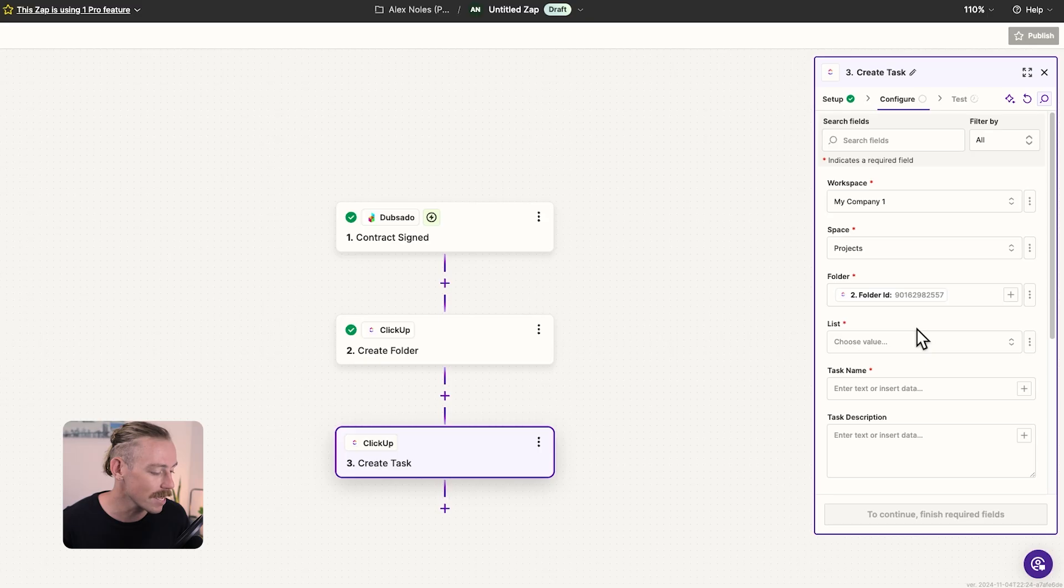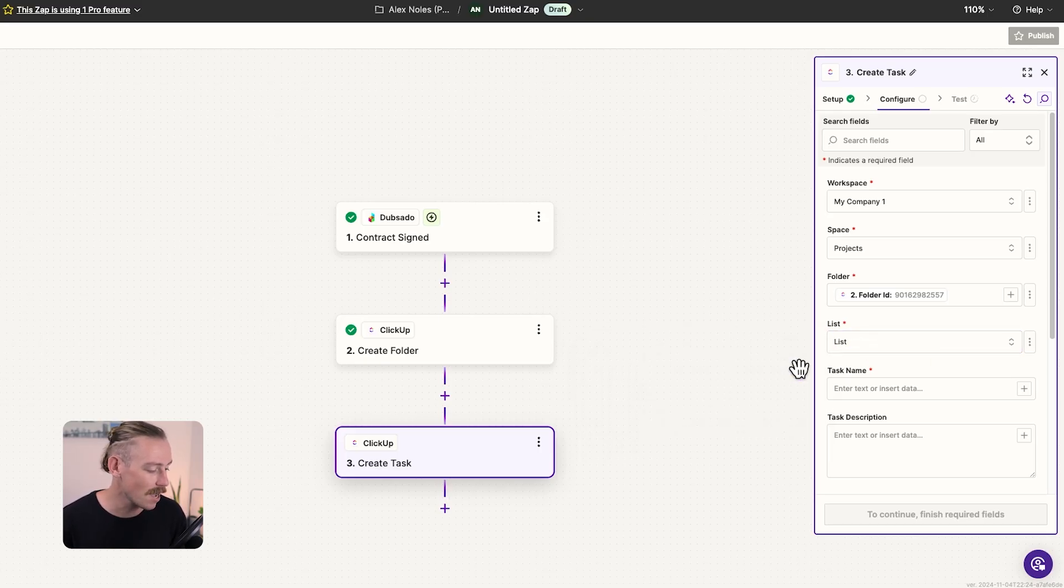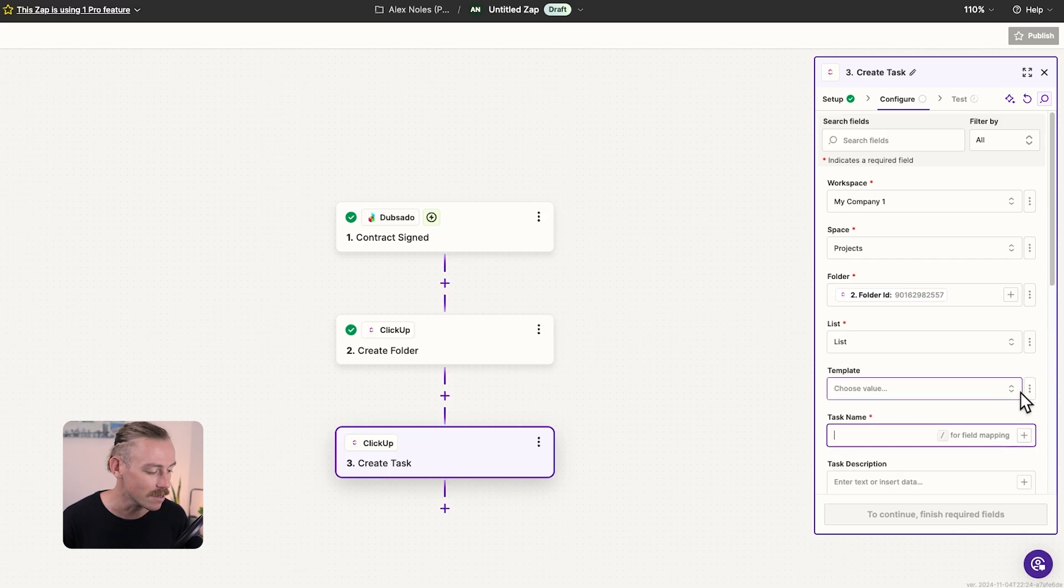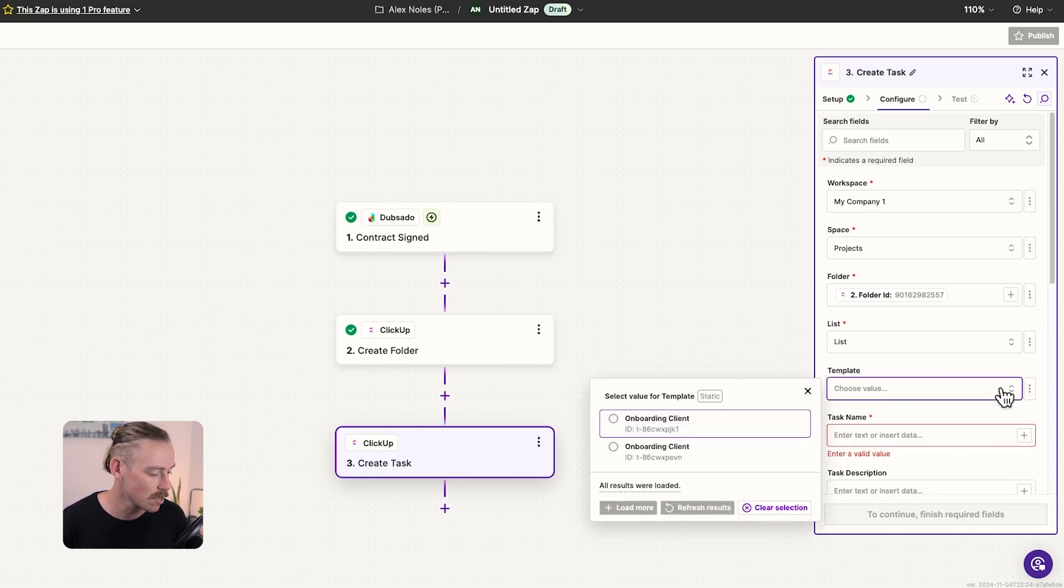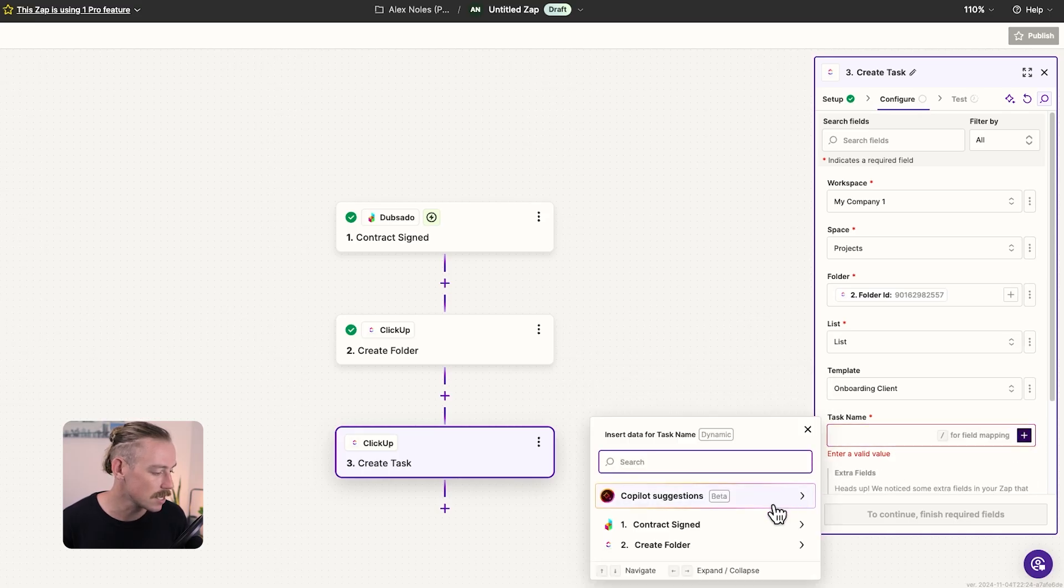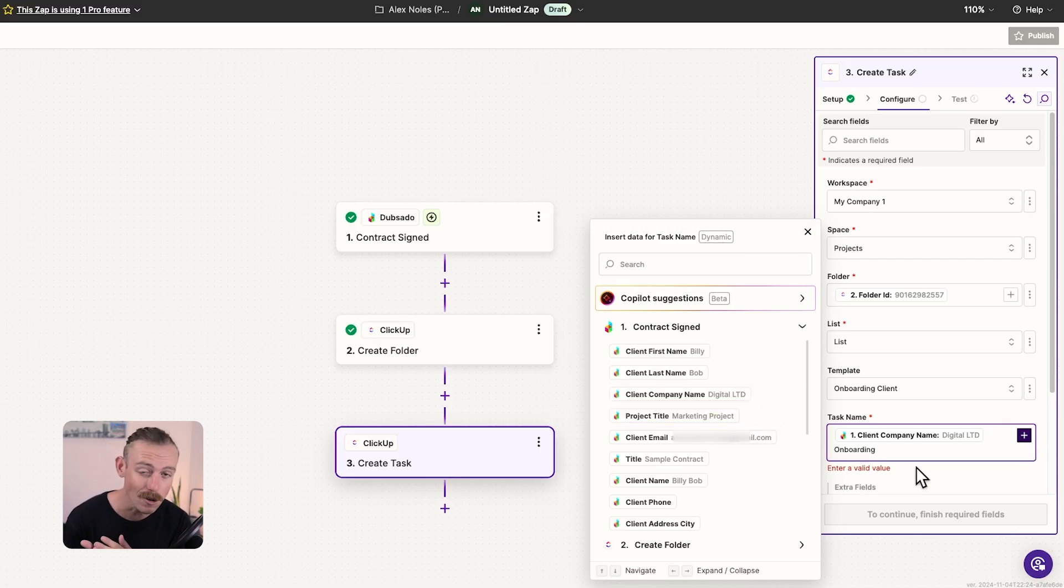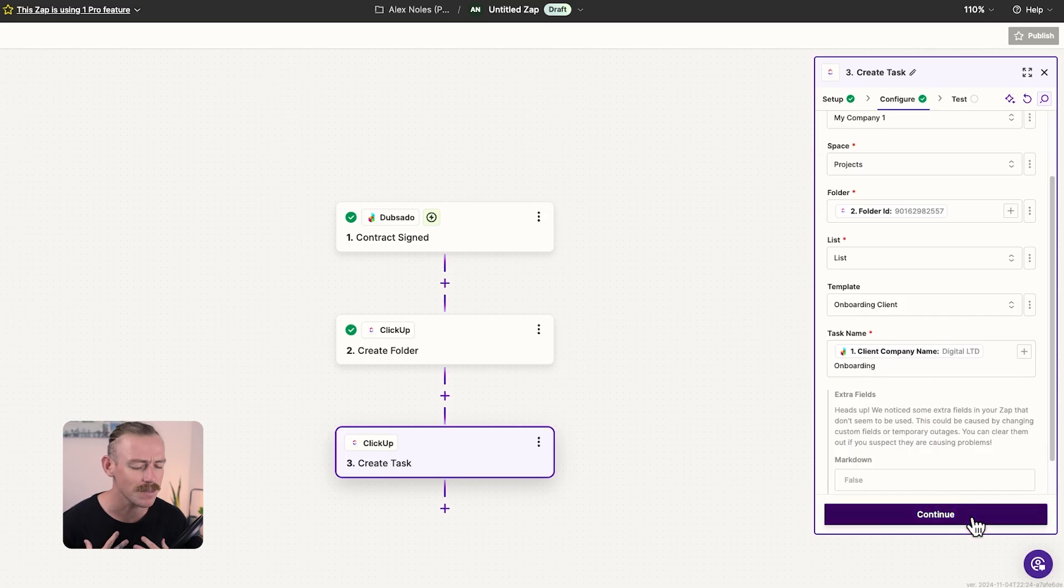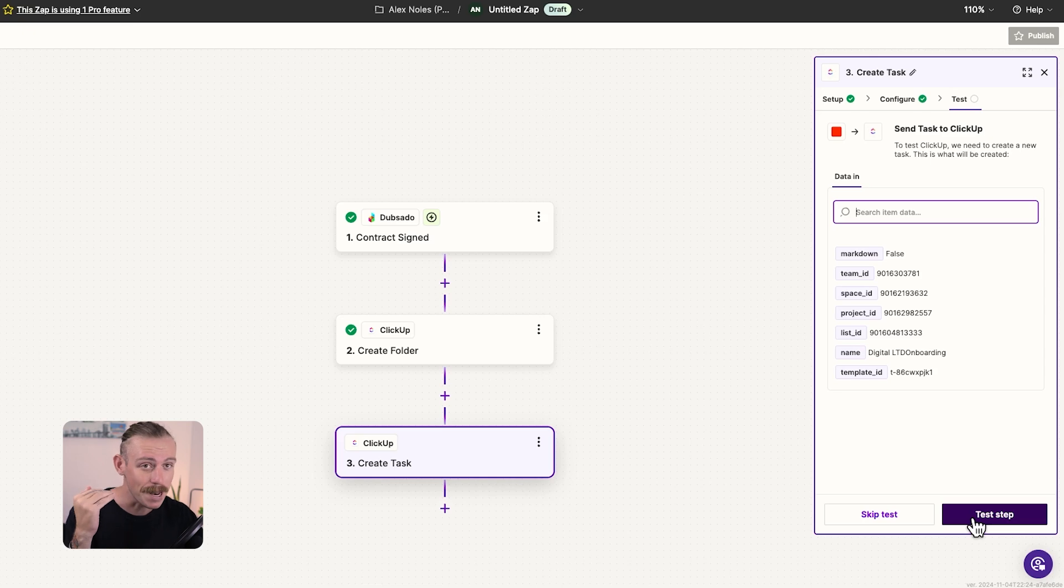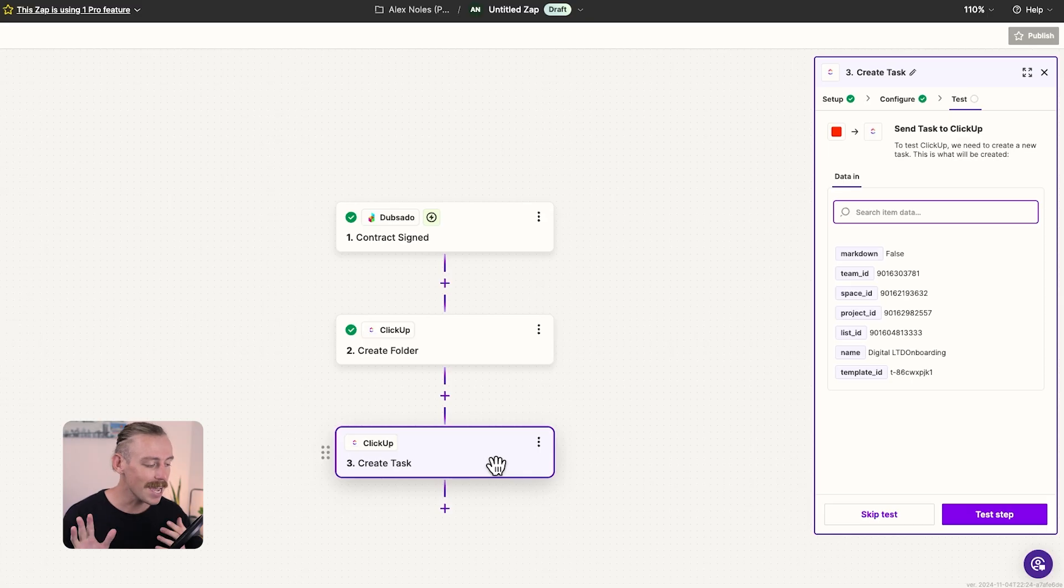Now, we can select list. I'll just do this quickly for mere example to get through it. And the task name. What we can now do is select the template we created earlier for onboarding the client. So what happens, we'll just quickly create the task name using the contract signed, the client's company name, and we'll say onboarding. So when someone signs the contract, that's the launch, the A-OK, for our team to start onboarding. It will automatically create a folder in ClickUp for our team to track and manage the onboarding project and create a task with those template subtasks and more.